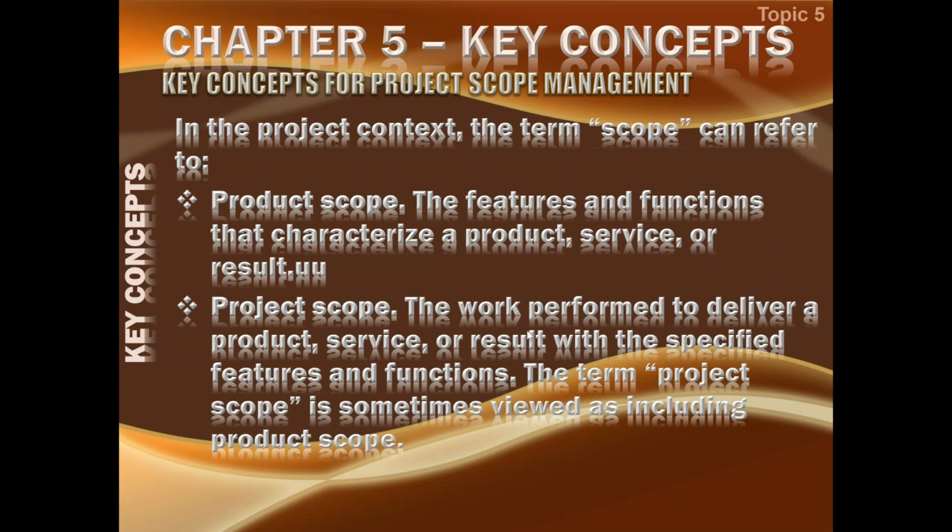We said all the work and only the work. I must be careful to include all that has to be done to create this product and do nothing extra. So all the work which must be done should be included, and all that is not required to be done should not be included. So I will define the in scope and out scope work. This is my project scope.